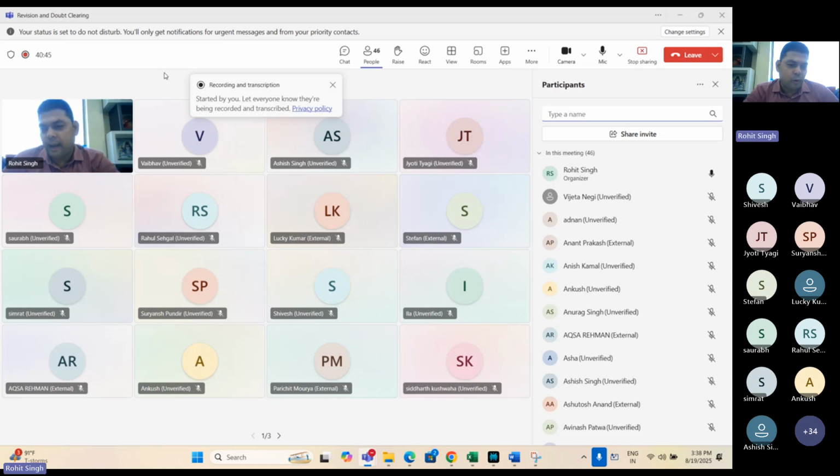Let's say every day I'm going to do one ticket, definition of ready and definition of done. That is your sprint, that is your period, and that is the number of tasks according to which you will create the burn down or burn up charts to show that you have completed it. If yes, good to go. If no, there should be a proper justification.